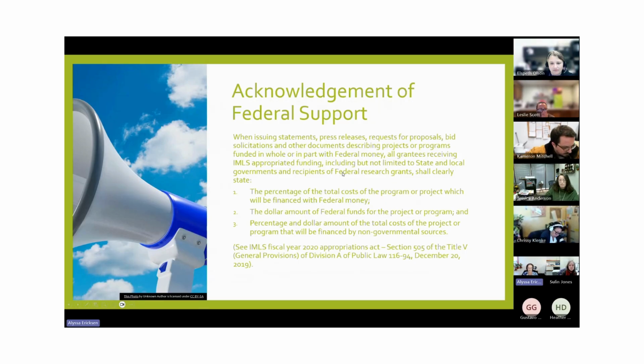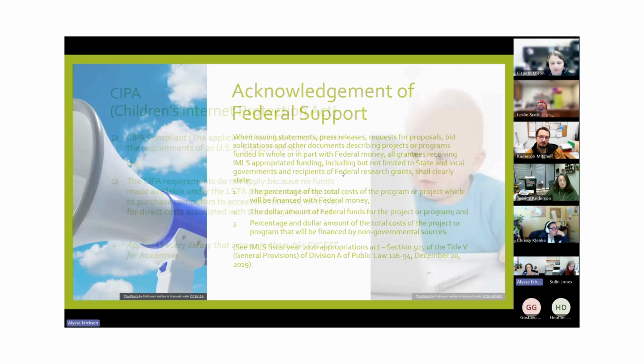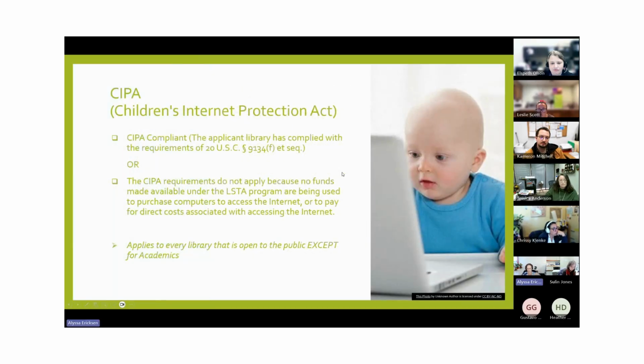So this is slightly different. You need to acknowledge federal support when you are issuing any kind of press statements, releases, any recording on the radio. Anytime that you're going out for bidding, you need to talk about the percentage of the project that is funded with IMLS funds. So just be consistent with that. We have pages on the website, also in the grant manual, that have more details on that too.